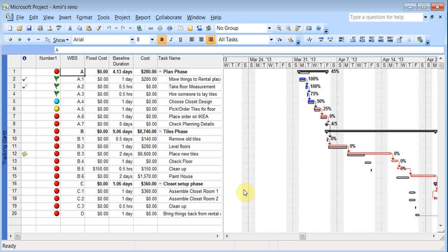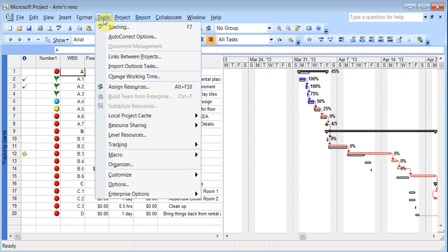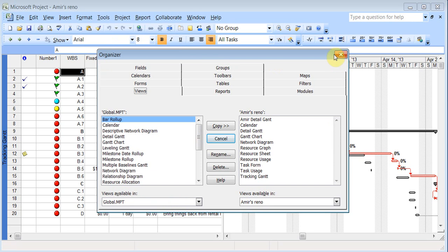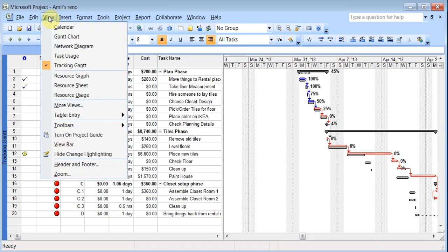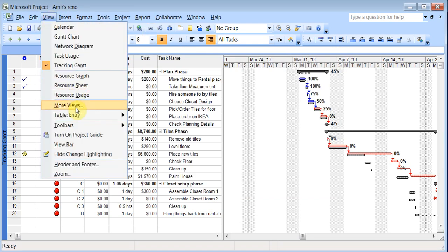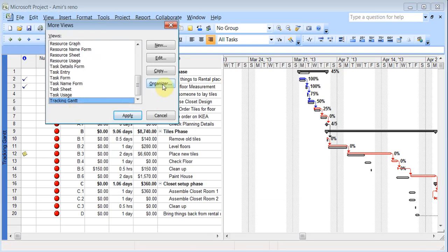Now all these things that we created, the custom calendars, the custom fields, you can actually import it to your template so that it is available to you in all your files. So to do this, you can go to tools and you can go to this organizer option. Or you can go to view, more views, and then click on organizer.